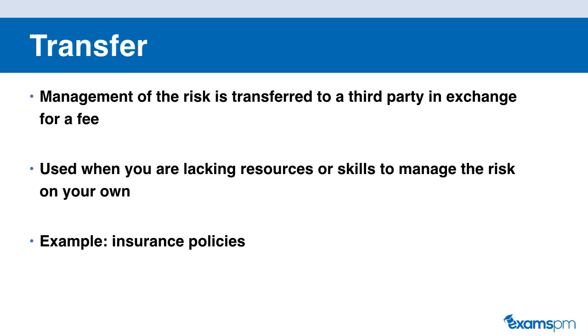An insurance policy is a great example of this risk response strategy. So here you purchase the insurance policy and therefore you transfer that risk to a third party in exchange for a fee. Please note that this strategy can cause a secondary risk to you. For example, though you ask the third party to manage the risk, you are still responsible for the guarantee with the client.